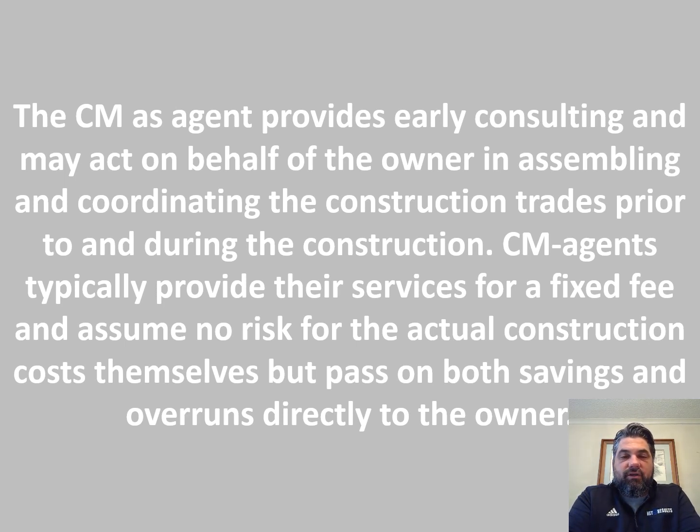So as an agent, they can act on behalf of the owner in terms of helping the owner obtain, say, geotechnical reports, surveys, preparing construction cost estimates, preparing project schedules, vetting general contractors and subcontractors to see if they're qualified to bid the project, things of that nature.